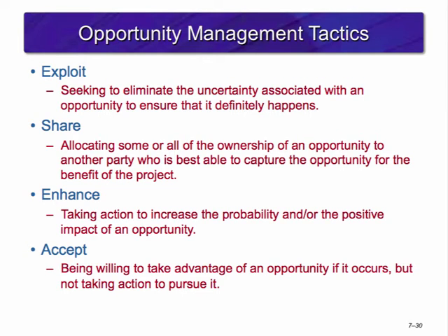For most of this chapter, we have looked at the negative side of risk. However, there is a flip side, the positive side of risk. This is often referred to as opportunity. An opportunity is an event that can have a positive impact on project objectives. For instance, favorable weather can accelerate construction work. Essentially, the same process that is used to manage negative risks is applied to positive risks. Opportunities are identified, assessed in terms of likelihood and impact, responses determined, and even contingency plans and funds established to take advantage of the opportunity if they happen.